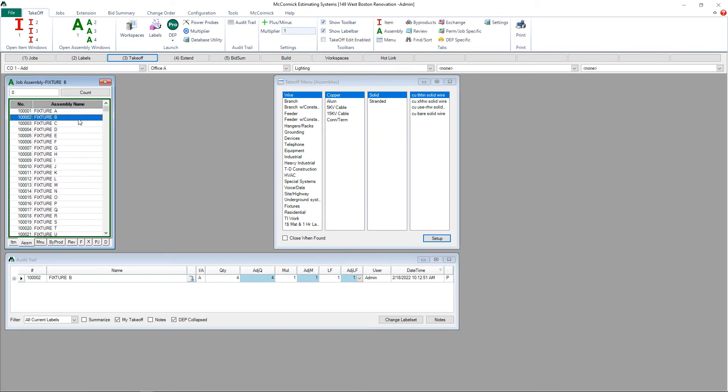From here, we can take the change orders through the next two steps, Step 4 Extension and Step 5 Bid Summary, just like we did for the base bid and the alternate one.